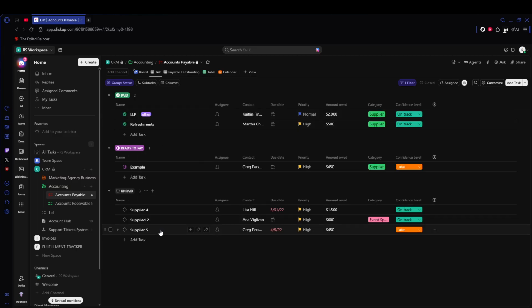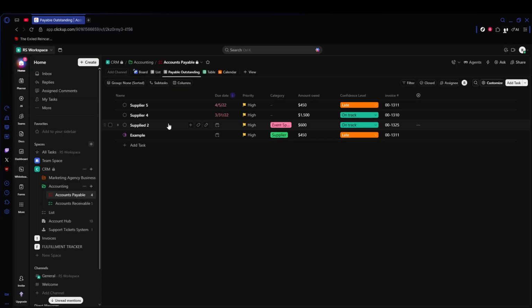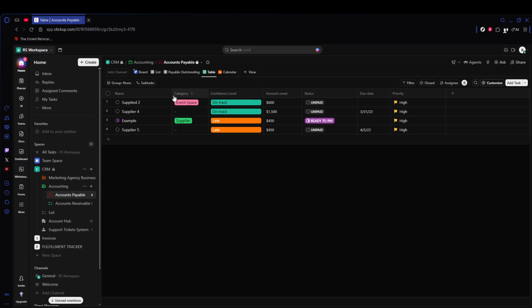Next, add another custom field named spent or amount spent. This can reflect the invoice or payment amount, or you can enter it manually. If your plan supports formulas, create a formula field for remaining and set the logic to budget minus amount spent.